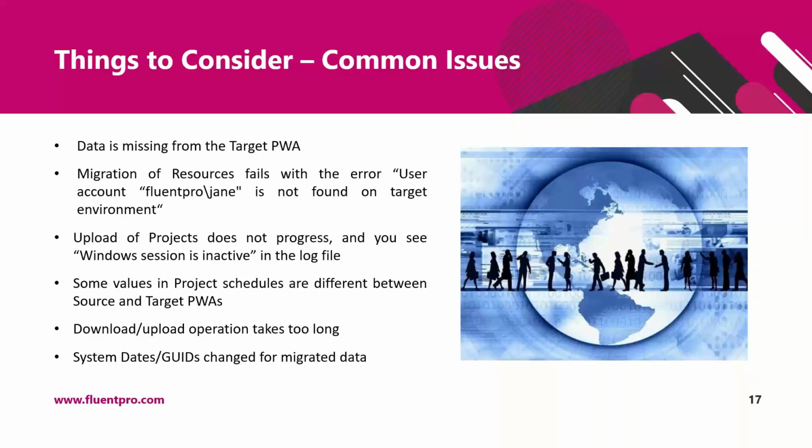Or, for example, if you upload projects before you upload workflows or before you upload resources. First of all, you will see errors during the upload. Second of all, your projects will not be skipped to a correct stage, and you will have issues with the task assignments.